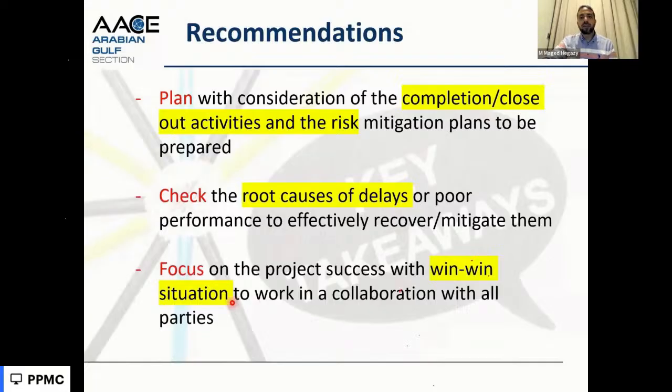And if they have extension of time, we need to provide them the extension of time and to plan their works according to their entitlement with appropriate resources. Sometimes we make more pressure on the contractor, getting more resources. Resources are idle on site and not productive, or we get the resources and accelerate the work with no need for acceleration. So we need to work a win-win situation for both parties for long-term relationships between the parties.